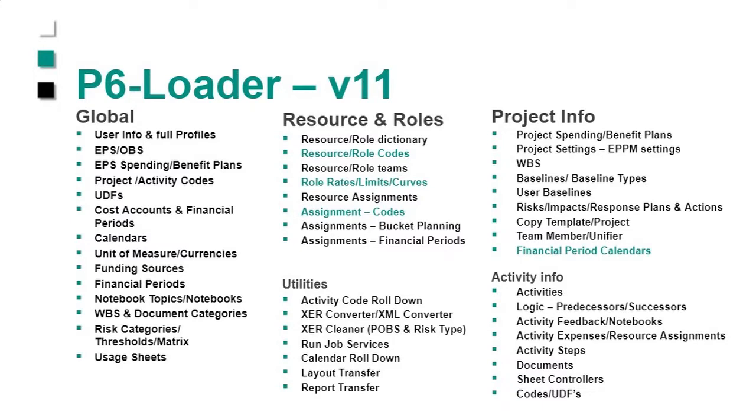So that's a big one, because there is an export import process around layouts in P6, but it doesn't really work very well, because unless the database you're moving to is exactly the same as the one that you're moving from, none of the layouts actually work. They come up with all kinds of errors, and then you've got to manually fix them, and it actually ends up being faster to just create them from scratch. But with P6 Loader, you can actually go and move layouts, filters, reports from one database to another.